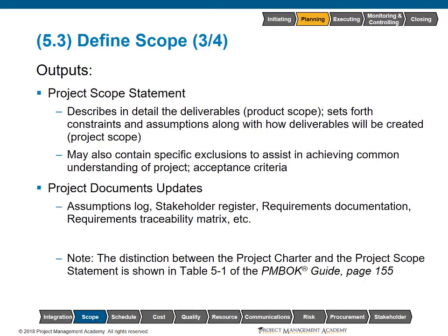The project scope statement. This is going to be one of the key outputs coming out of this process. I do want to go ahead and differentiate between the product scope versus the project scope. So if we were talking again about a personal electronic device, let's just say it's going to be a tablet. We have certain requirements that our customers will give us. And these might include front and rear facing cameras, LED illuminators, intuitive touchscreen, buttons, switches, speakers, processors, batteries, perhaps some aspects of the casing. Now, that would be the product scope.